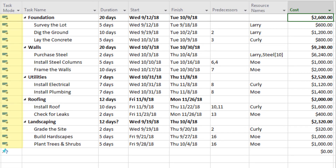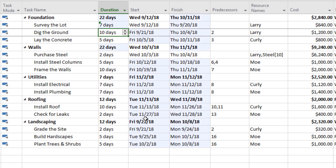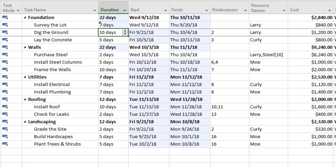Let me revisit the task mode column to illustrate why switching to auto-scheduled was so important. If we find that surveying the lot is going to take seven days instead of five, Microsoft Project will automatically push out all the activities that come after it. Rather than manually going through every line and changing dates, the predecessor relationships built in allow Microsoft Project to make those adjustments automatically — saving a lot of time as we maintain and update the schedule.